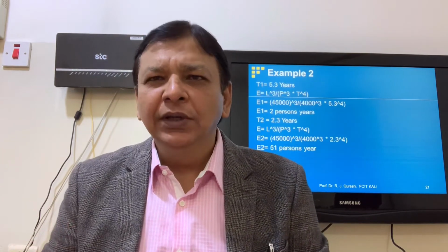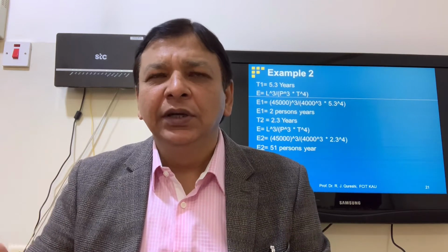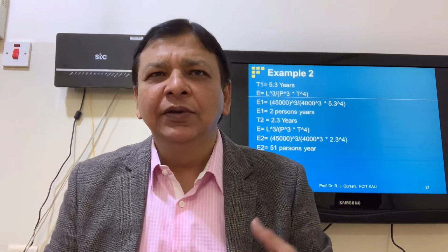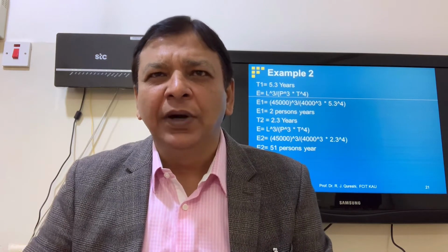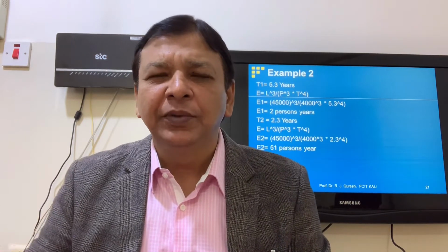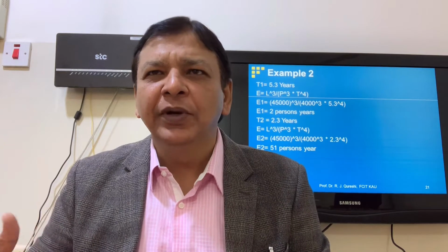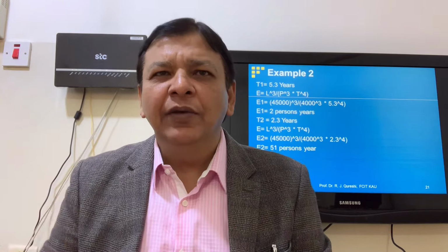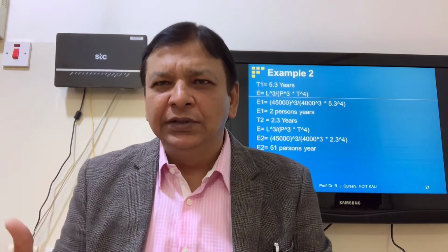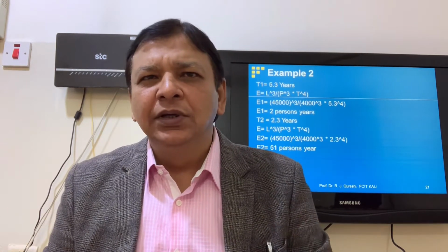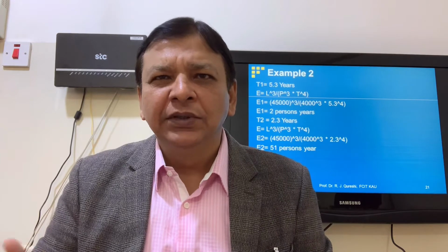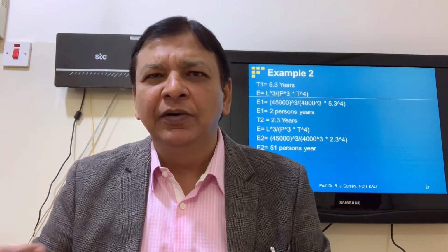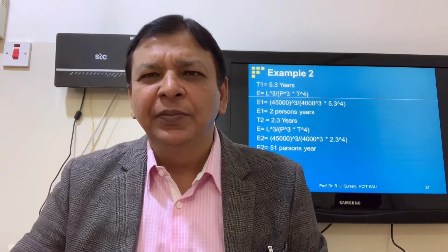So if T1, scenario 1, is equal to 5.3 years, what is the effort? E1 is equal to 45,000 power 3 divided by 4,000 power 3 multiplied by 5.3 power 4. That is approximately 2 person-years. Now we have scenario 2, if we decrease the time by 1 year. E2 is equal to 45,000 power 3 divided by 4,000 power 3 multiplied by 2.3 power 4. E2 is equal to 51 person-years.